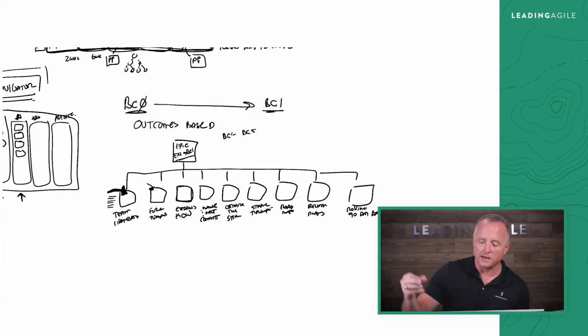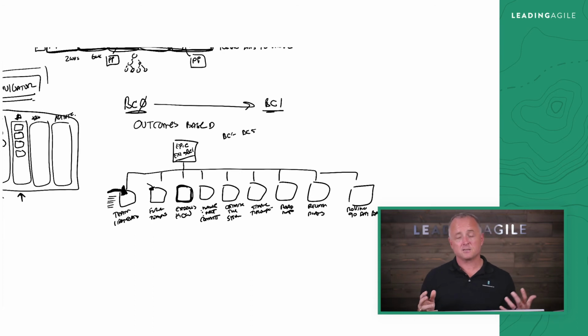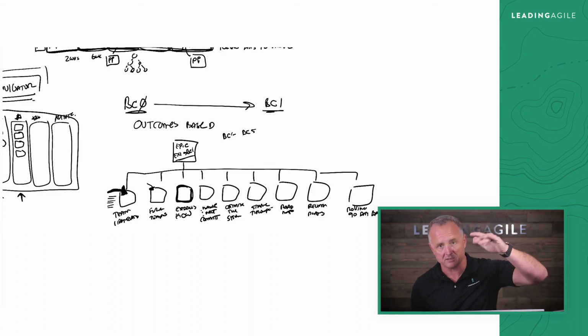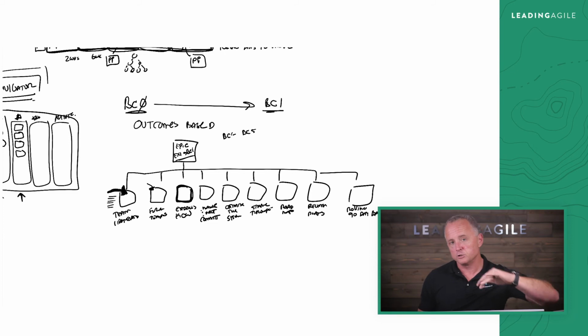And then I want to, by virtue of building backlogs, installing governance, right, doing all the different alignment activities, all that stuff, I want to establish flow across those teams, which basically means that I'm going to take epics and decompose them into features and features into user stories. And I'm going to sequence all of the user stories in such a way with my product owners such that features flow across and epics flow across.